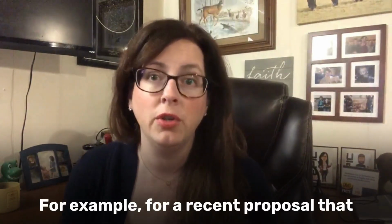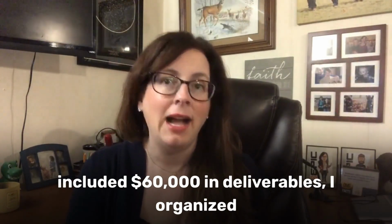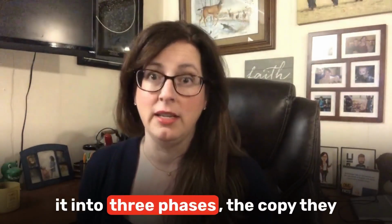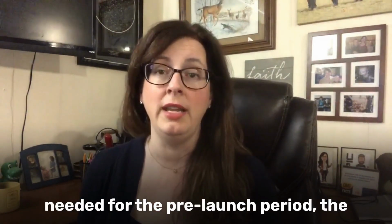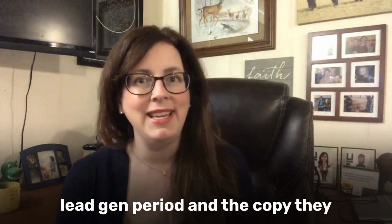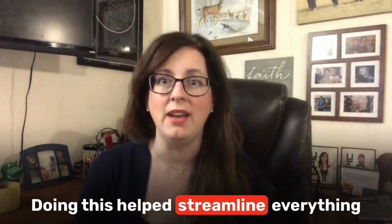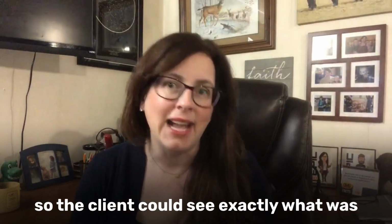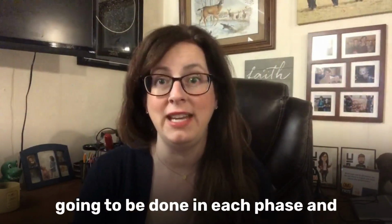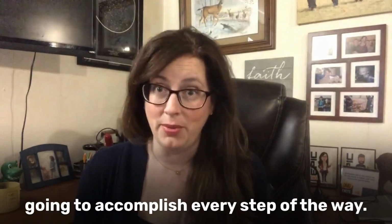For example, for a recent proposal that included $60,000 in deliverables, I organized it into 3 phases: the copy they needed for the pre-launch period, the copy they needed for the traffic and lead gen period, and the copy they needed for the sales and remarketing period. Doing this really helped streamline everything so the client could see exactly what was going to be done in each phase and get a manageable view of what we were going to accomplish every step of the way.